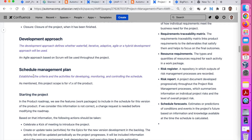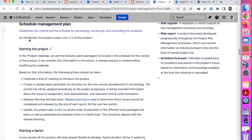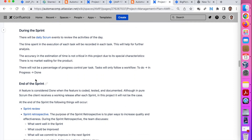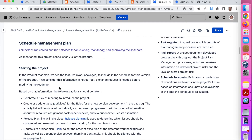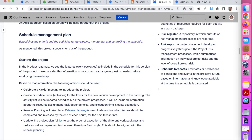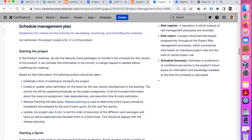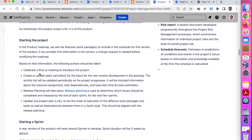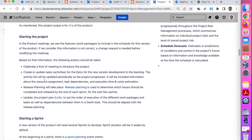Then the schedule management plan establishes the criteria and activities for developing, monitoring, and controlling the schedule. It explains how the schedule will go — what will happen when starting the project, when starting each sprint, during the sprint, and at the end of the sprint or at the end of the project. For example, when you start a project, you celebrate a kickoff meeting — it is typical to introduce the project to the stakeholders — or have a release planning where you create all the activities. When you start a project, you need to meet the technical people and others to start creating the tasks. We saw the work breakdown structure, and from it we end up splitting the different epics into tasks.